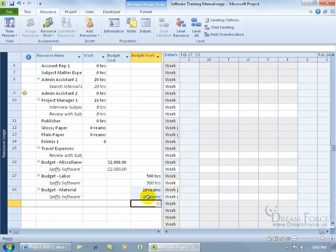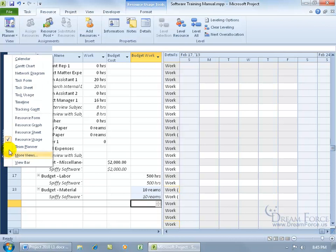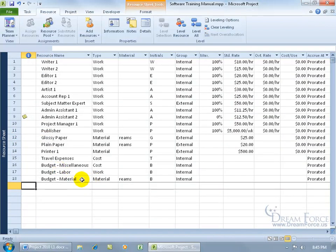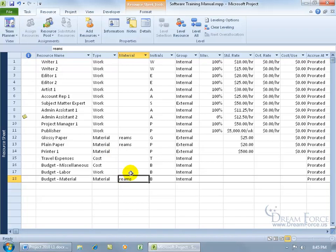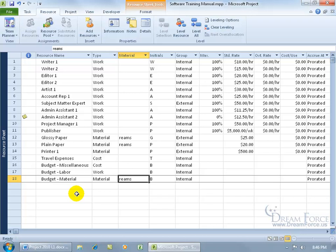Notice how it comes up 'reams.' As you recall from the resource sheet, the budget material label is set to 'reams.' It will keep track of glossy paper and plain paper reams, but also the printer, since that's a material too. You could delete 'reams' and track all materials together, or add an additional budget material — one for reams and one for printers — and you can keep adding more, like pencils and pens in boxes.